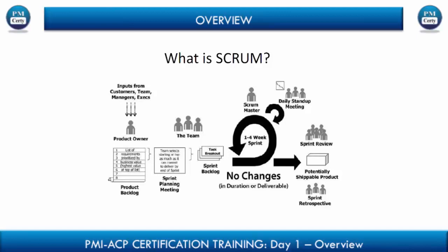The product owner now picks up a set of the highest priority of requirements and fits it into the iteration or the sprint. So interestingly and important to remember, once the time for a sprint or iteration is fixed, let's say 4 weeks or 3 weeks or whatever period we take, every sprint or iteration must have the same timeline, which means if you have the first sprint of, let's say, 3 weeks, every subsequent sprint will also have to be of 3 weeks. You can't have one of 3 weeks, one of 5 weeks, one of 4 weeks, and so on. Everything must be uniformly time boxed. We call it time boxed.